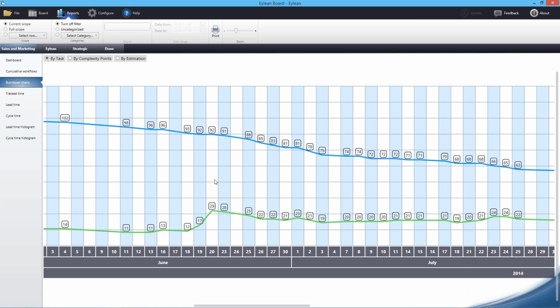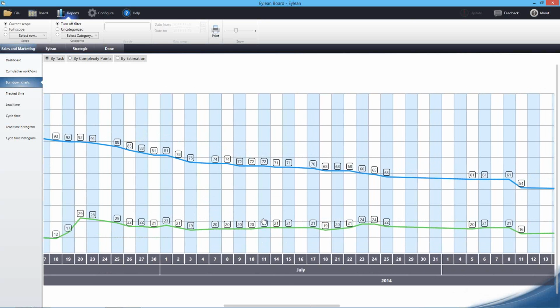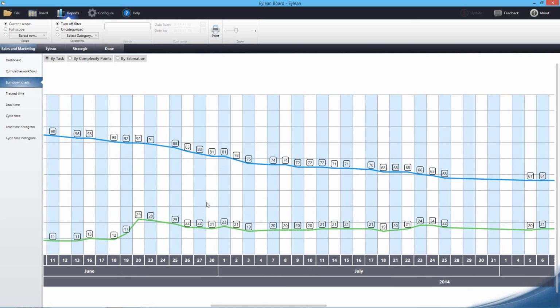In a sprint you cannot add new items, but some Scrum-buts, as they're called, people who do Scrum in a partial way, not with all the methodologies implemented, tend to input new items during the sprint. So you can see if your actual item count is increasing or staying the same, stalling, then you're doing a bad practice. You're adding items during the sprint or during the iteration. So there are lots of insights, as I told you.